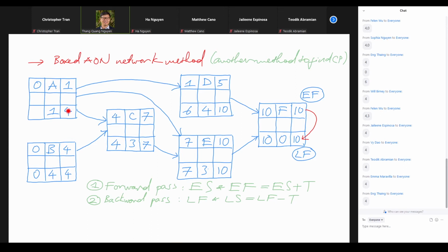But because we try to find the latest date, right? So that's why we try to hit the constraint among 4 and 6 and 6 and 7, right? 4 is the constraint that we need to hit. So we write out here 4 as the latest. Otherwise, if it is a free number, then you can write out 3 or 2 or 1 or anything like that, right? But because we try to find the latest date, that's why we choose the minimum among these 3 numbers. Okay, so if we have 4 right there, we backtrack by 1 week, then we have 3 here.